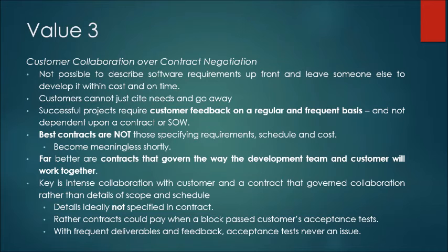So the key is intense collaboration with the customer and a contract that governs the collaboration, rather than details of scope and schedule. Details are ideally not specified in the contract. Rather, the contract could pay when a block passes the customer's acceptance test. With frequent deliverables and feedback, acceptance testing will never become an issue.